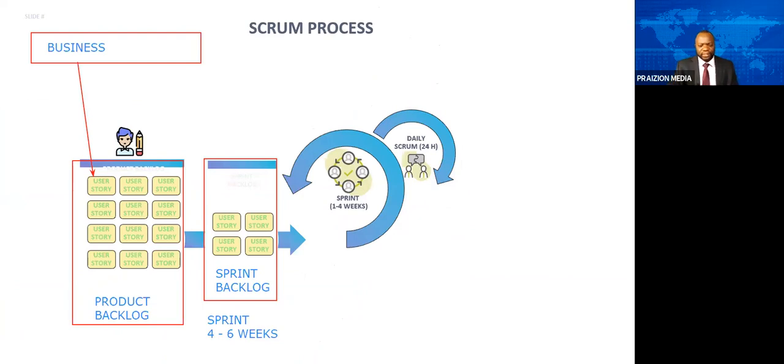What are the impediments I can help you remove? And we have an individual known as a Scrum Master. The Scrum Master is that person who removes impediments for the team, who helps the team in a servant leader capacity. Every 24 hours, this daily stand-up that does not exceed 15 minutes most times is held.